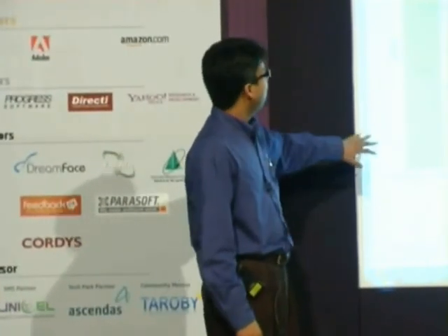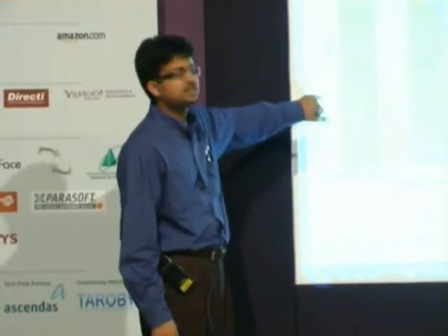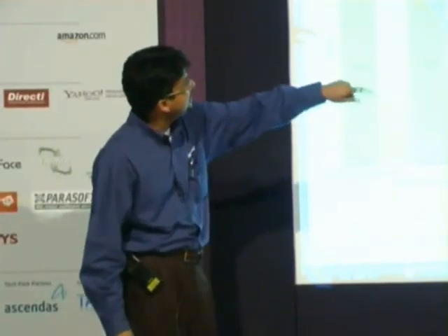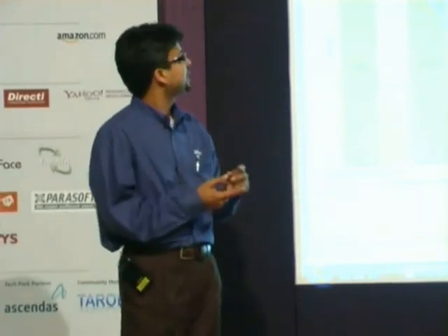So quality indicators is an example. It might be a little hard for you folks in the back to read, but across the project timeline and across my builds, it shows me how many tests have passed and how many tests have failed as the bars. And each of those lines shows various things such as code churn, code coverage, and active bugs that are in my system.